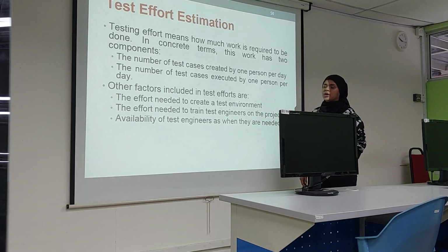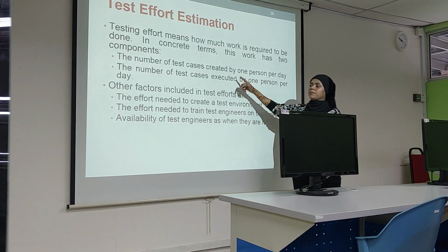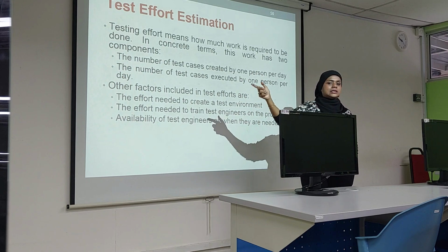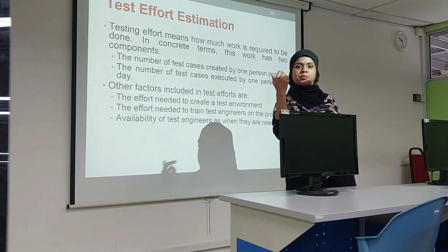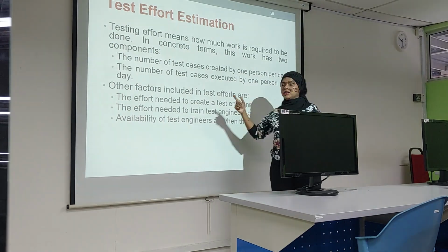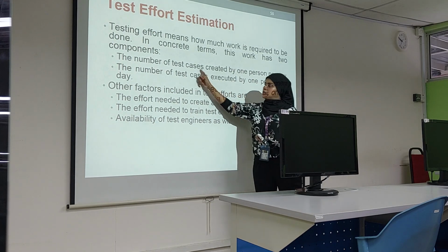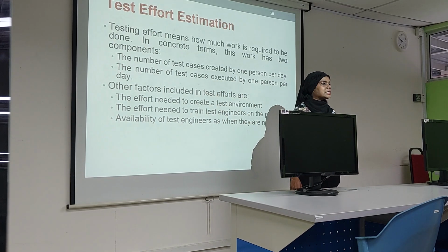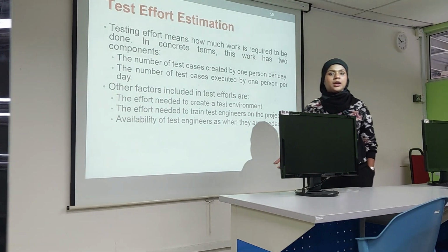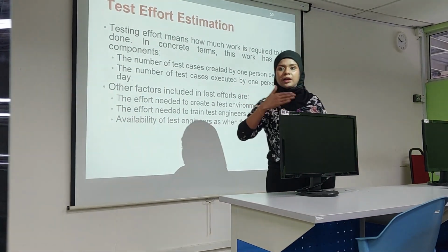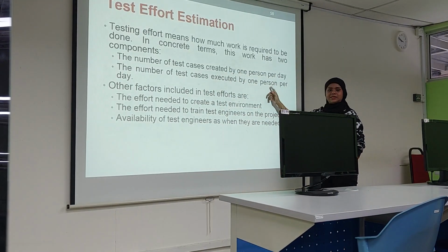So when we want to estimate the test effort, we need to know how many test cases can be created by one person, with their skill, their experience, their knowledge, and how fast they can create test cases in a day. And the same goes for how many test cases can be executed per day. Because from there, we can estimate the timeline of our testing. So it's very important for us to estimate the right amount of effort.